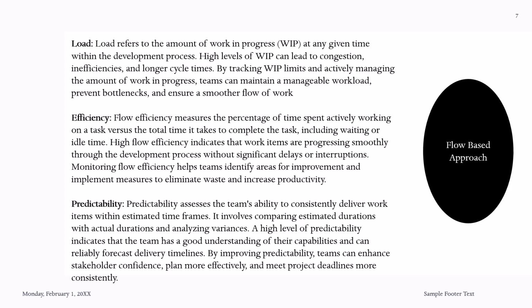So flow efficiency measures the percentage of time spent actively working on a task versus the time it takes to complete the task, including waiting or idle time. High flow efficiency indicates that work items are progressing smoothly through the development process without significant delays or interruption. So monitoring flow efficiency helps teams identify areas of improvement and implement measures to eliminate waste and increase productivity.